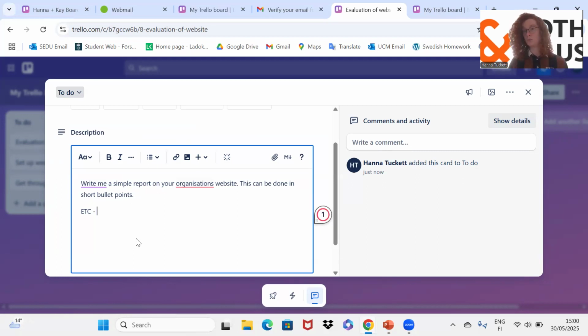If a task is too big, it must be broken down into much smaller tasks, which makes it, again, much more doable, and so that the sprint can be realistically complete. So for this, I would prescribe that you use no more than 3 hours, which is the max that we can use for any given task.